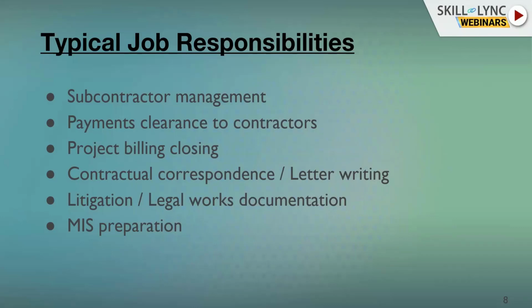Then litigation and legal works and documentations. Sometimes what happens, the developers, consultants, contractors, they are not on the same page. So one party goes to the NCLT or High Court demanding the liquidity damages or additional cost. In that case, all the correspondence which we earlier did has to be mapped and all documents have to be given to the legal department, so that the legal department can work out the case against the particular party.